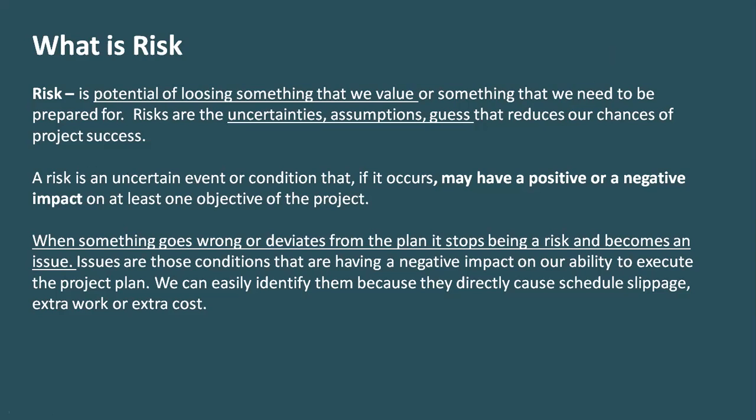For example, if I'm running a project, let's say I'm constructing a dam, I need 1,000 people, but getting 1,000 people at a particular location is not easy. So that human resource could be a risk, right? Let's say I'm running an IT project with a team of 10, but 2, 3 of my potential resources have a high chance that they will quit because they are not happy for certain reasons. So that is a risk.